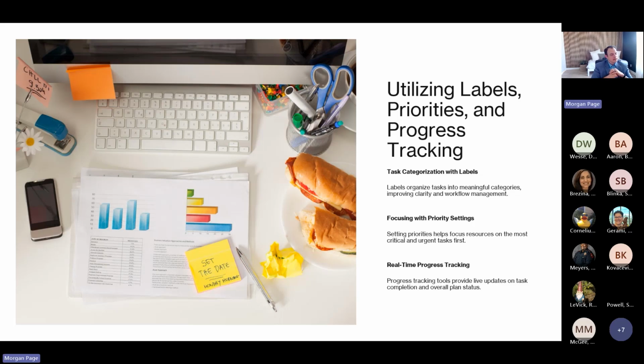Priority settings. So speaking of dependencies, oftentimes I'll have these with a higher level priority, just from a logistics perspective of execution. And so when we're looking at priority, being able to say, I know if I don't get this done, for example, Ron's team may not be able to take their next step. And so if we play this out, we've got a 12-month program. If I'm month 11 and a half and I go, oh yeah, I got to get this done and I get it done real quick, Ron's team may not have time to spin up and get it done, or it may be a huge fire drill and emergency. So I have a downstream impact.